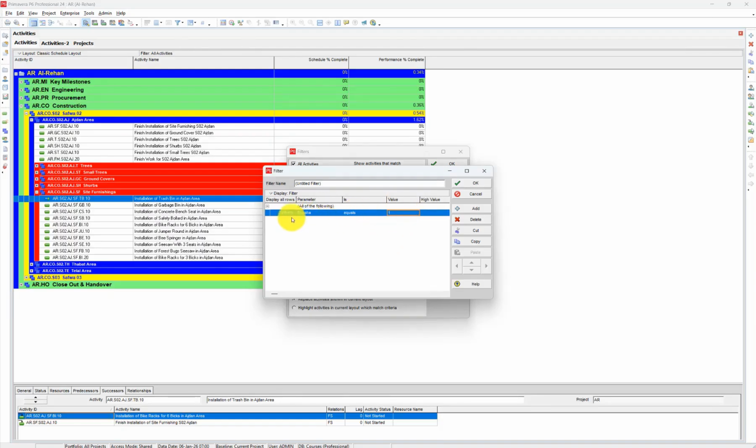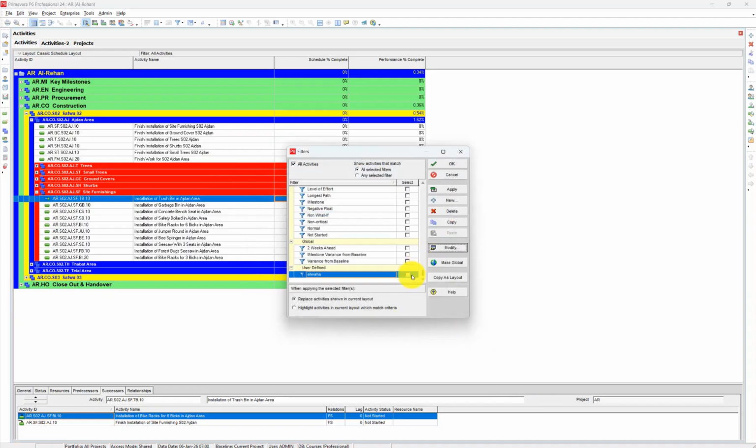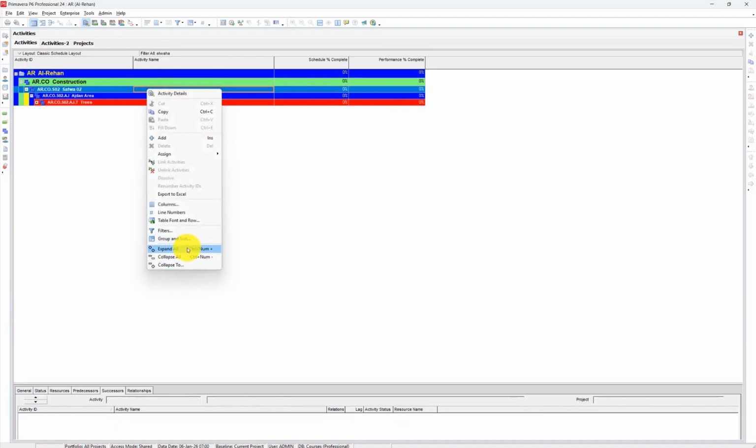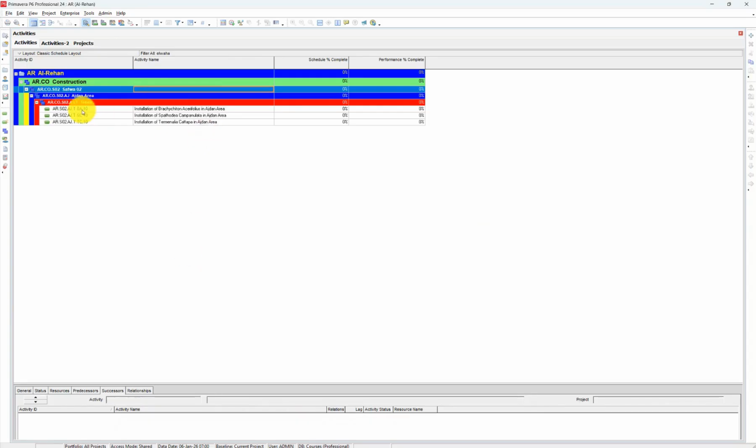Meaning the activity code, which is called 1. Of course, the tool is what created this activity code. You don't need to create it. And you write this condition. You save this filter. That's it, just once. As soon as you run the tool, the filter is activated and you apply it. It will filter only for the activities you want.